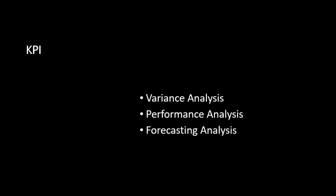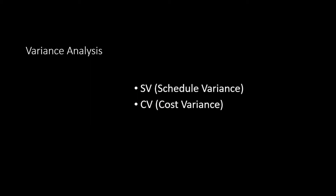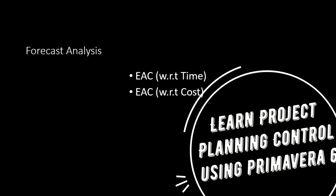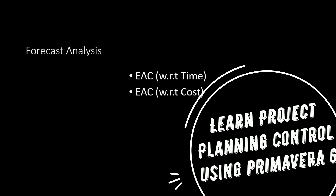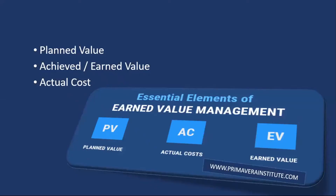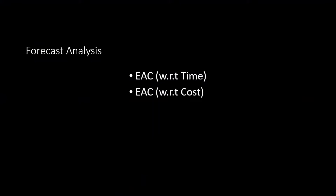In KPI, you have three kinds of analysis: variance analysis, performance analysis, and forecasting analysis. Variance analysis shows deviations from the planning phase to the execution phase. Performance analysis shows the performance status. Forecasting predicts what you have and what you need to complete the project on target. In variance analysis we cover schedule variance and cost variance; in performance analysis, schedule performance index and cost performance index; and in forecasting, estimate at completion for time and cost.